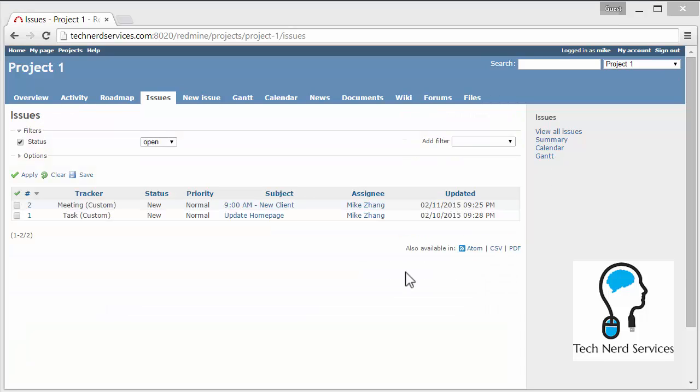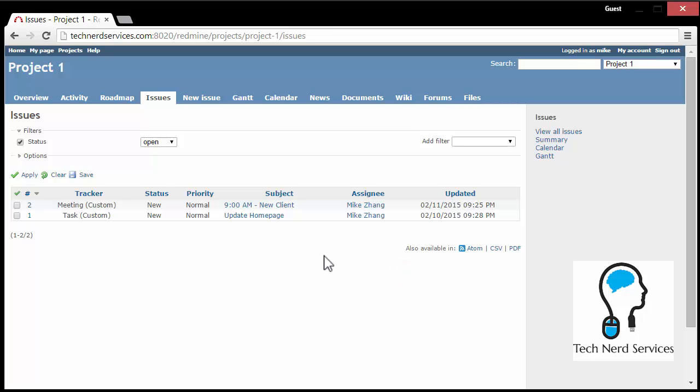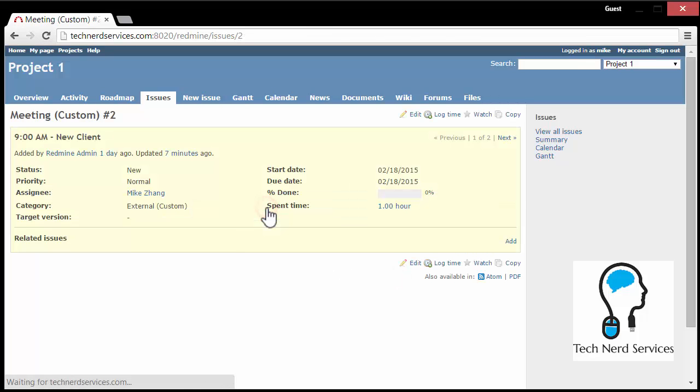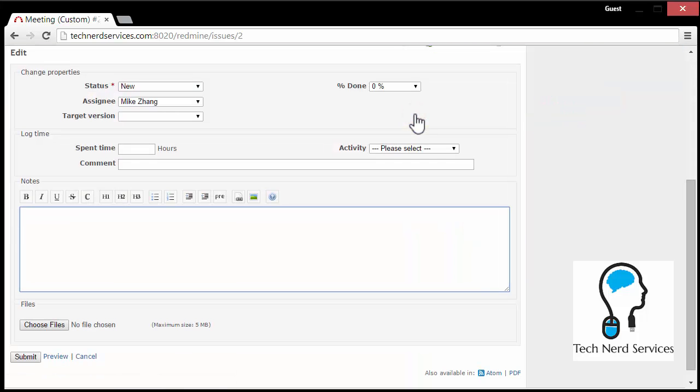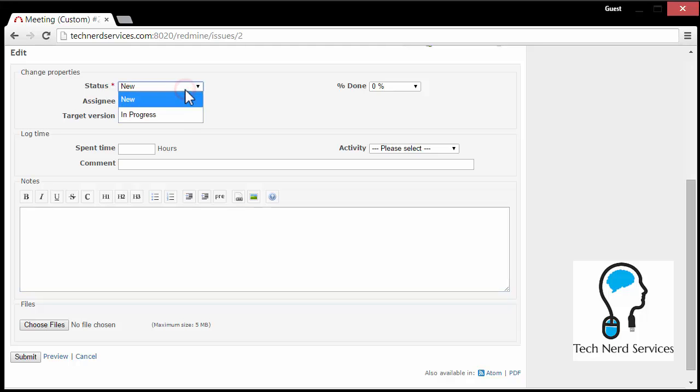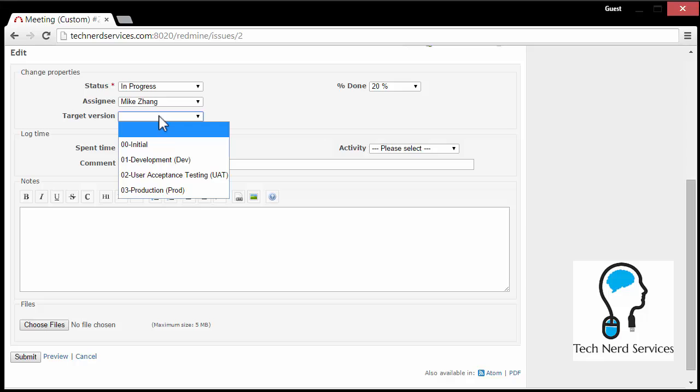So we've made changes to the settings of this particular account, and now I can show you that when I go into a particular issue, if I wanted to update and make changes, once again I can click on the edit. And in the edit, now here I can choose to change new to in progress, and I can even give it a percentage as well as logging my time. The target version, it does depend if you do choose to use different versions for the project. If you don't set any versions, this field does not exist. But this just gives you an idea that if this was a project that did have a dev component, a UAT component, and a production component, you could change which issues are for which stage of the implementation of this project. So it is one of those optional things that once again, you can choose to customize in here or not.